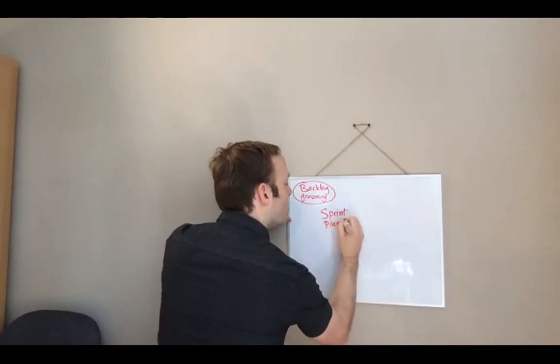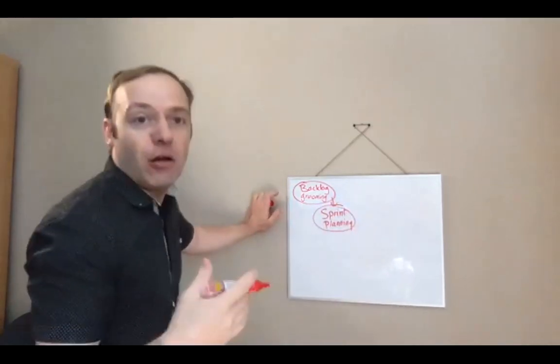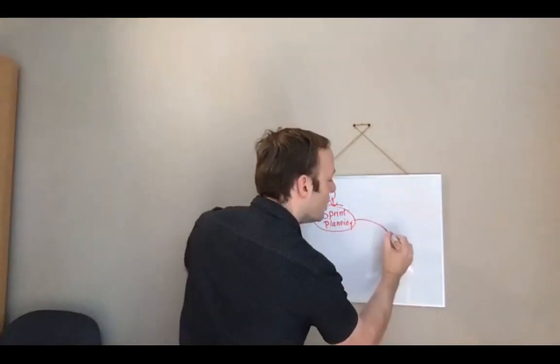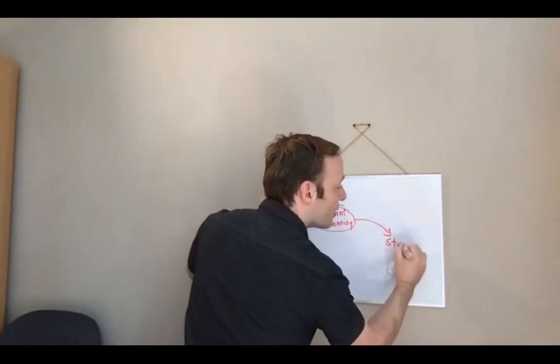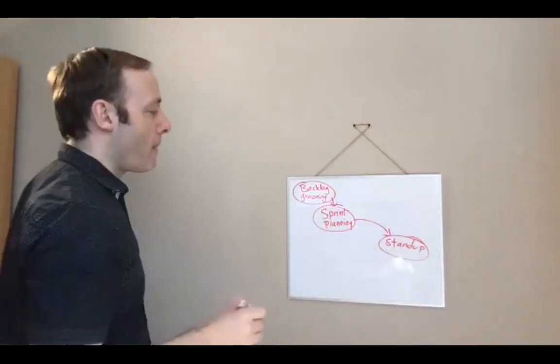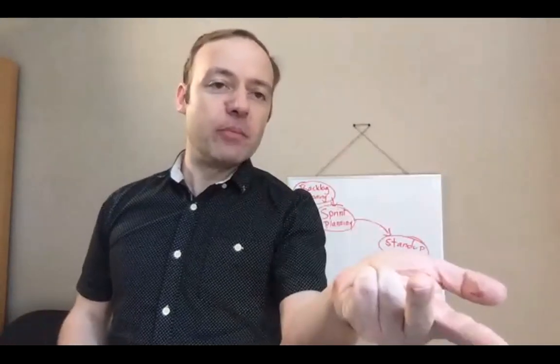So you just sit down with the team and ask them how much they think they can do during the next week or the next month. And then every day, or every second day maybe, you are going to do a stand-up meeting, a daily stand-up, where the developers say what they've been working on, what they will work on next, and whether they are blocked.